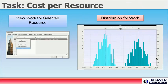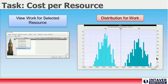If we would like to further investigate the source, we can look at the specific variable work, and therefore cost, for each resource allocated to a specific task. This particular view, which is very tightly correlated with the previous results, would indicate that in order to control costs, we would need to focus on this particular resource as being the root cause of the predicted overruns in this activity.